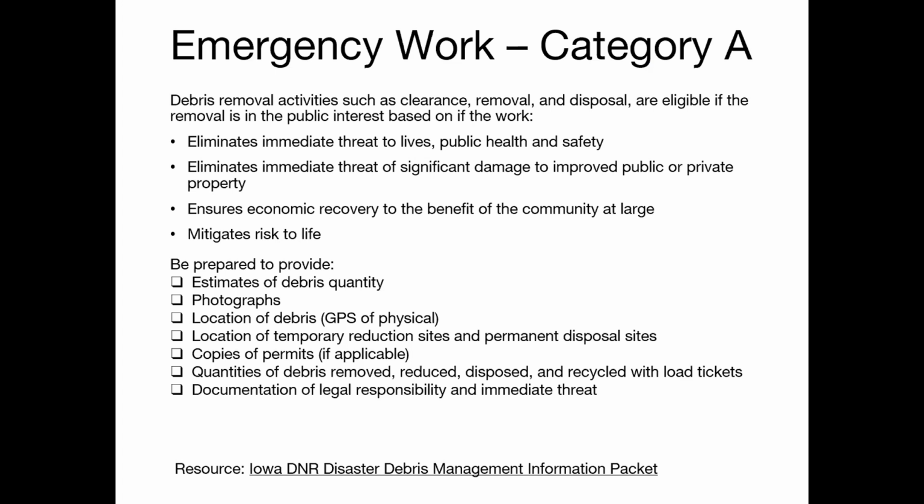If you have debris removal needs in your community, it is really important to take a closer look at the specific requirements, eligibility criteria, and documentation needed outlined in the PAPPG. For example, grinding or removal of a tree stump is only eligible if 50% or more of the root ball is exposed, or if you hire a contractor to remove the debris, you may also need to hire a monitoring company.